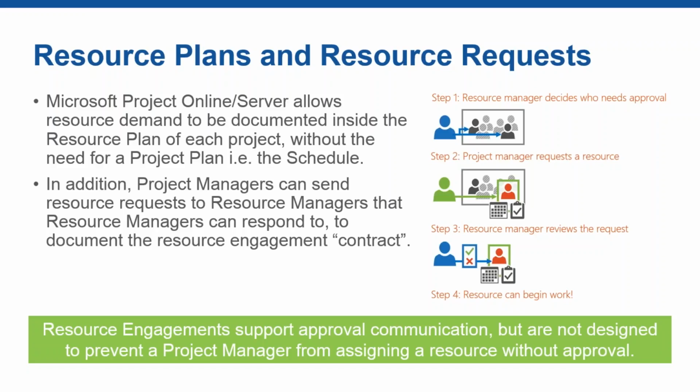that allows you to later refer back to the contract and see, looking at my detailed schedule, are we still within the brackets? Are we over, under, or maybe there was a delay and we need to work with this developer for much more time than we had anticipated, and therefore I may need to submit a new request to keep working with the same person to make sure he or she isn't assigned to another project in the meantime. Okay, so we'll demonstrate it later on today. That's a really exciting feature.